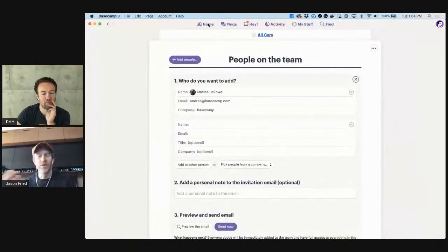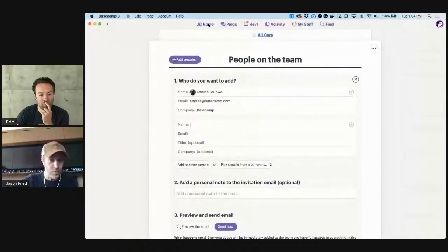There's no real time frame for these things because these are ideas that are bubbling up. But at some point he had enough to share with us in detail. We said that was good. We scheduled it for a 6-week project in one of our 6-week cycles, and it became reality. So that's kind of the life cycle of it.